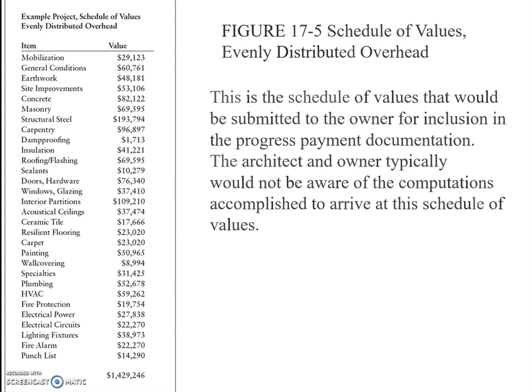This method is commonly used by contractors. As the owner is very reluctant to pay for anything that is not earned, considerable caution is used by owners, architects and engineers, and construction managers to avoid front loading. Regulations on public work may prohibit front loading as well.